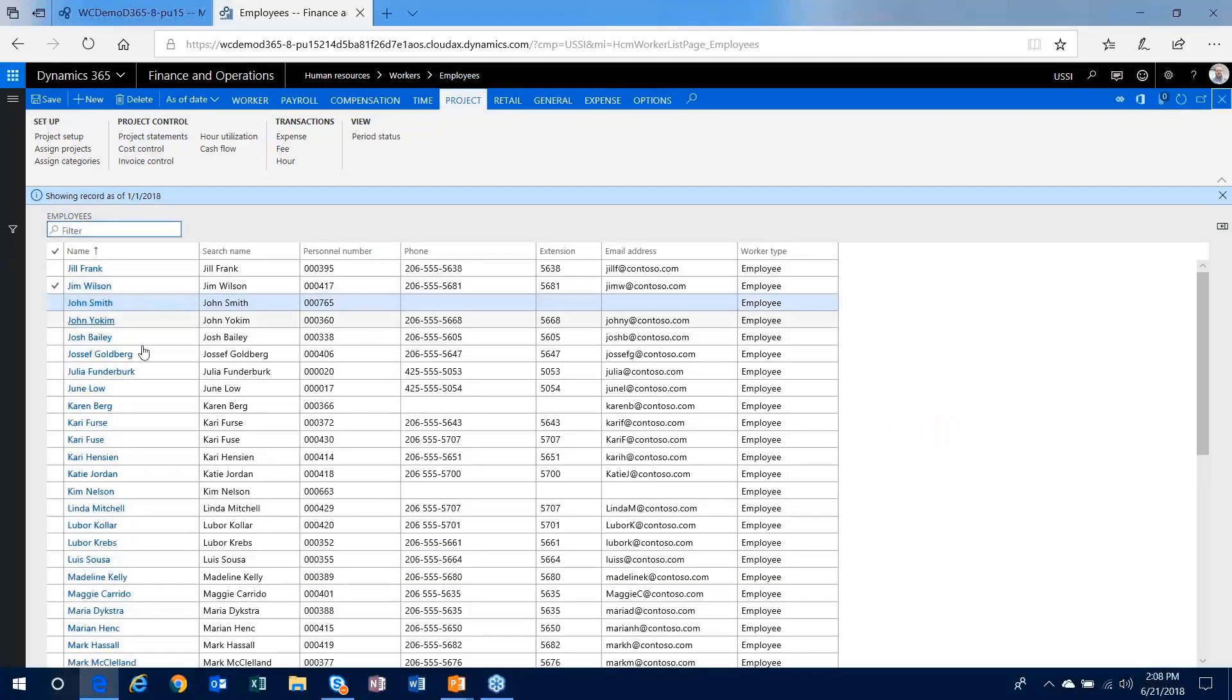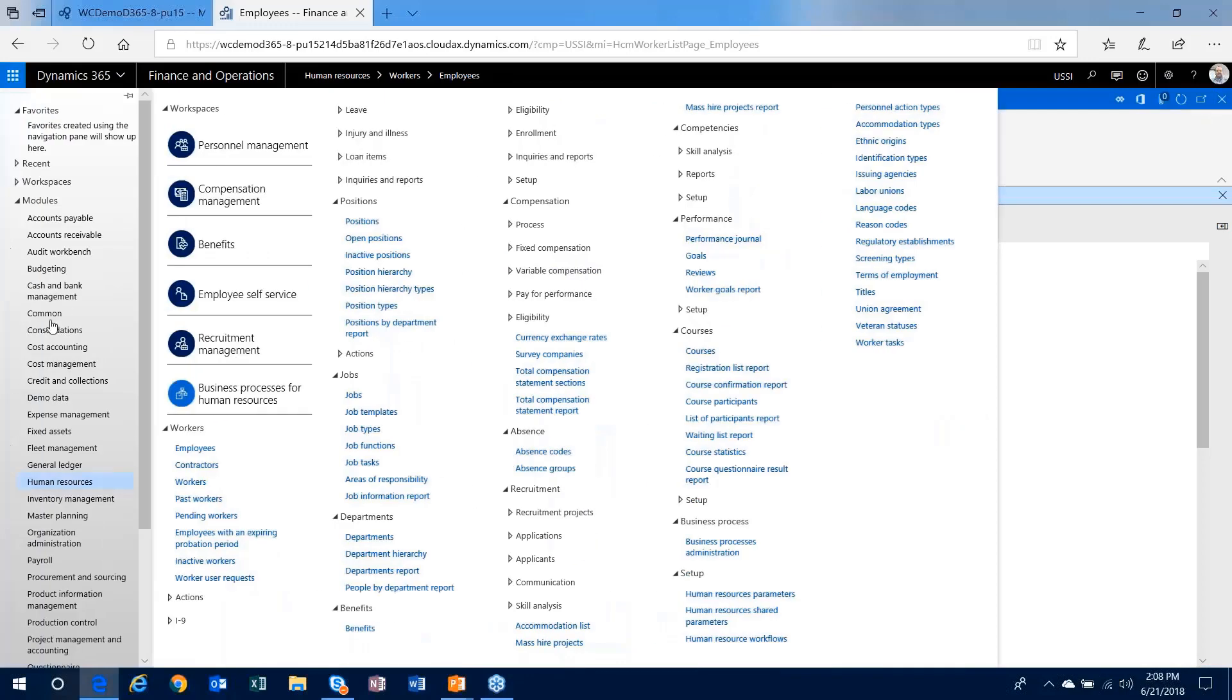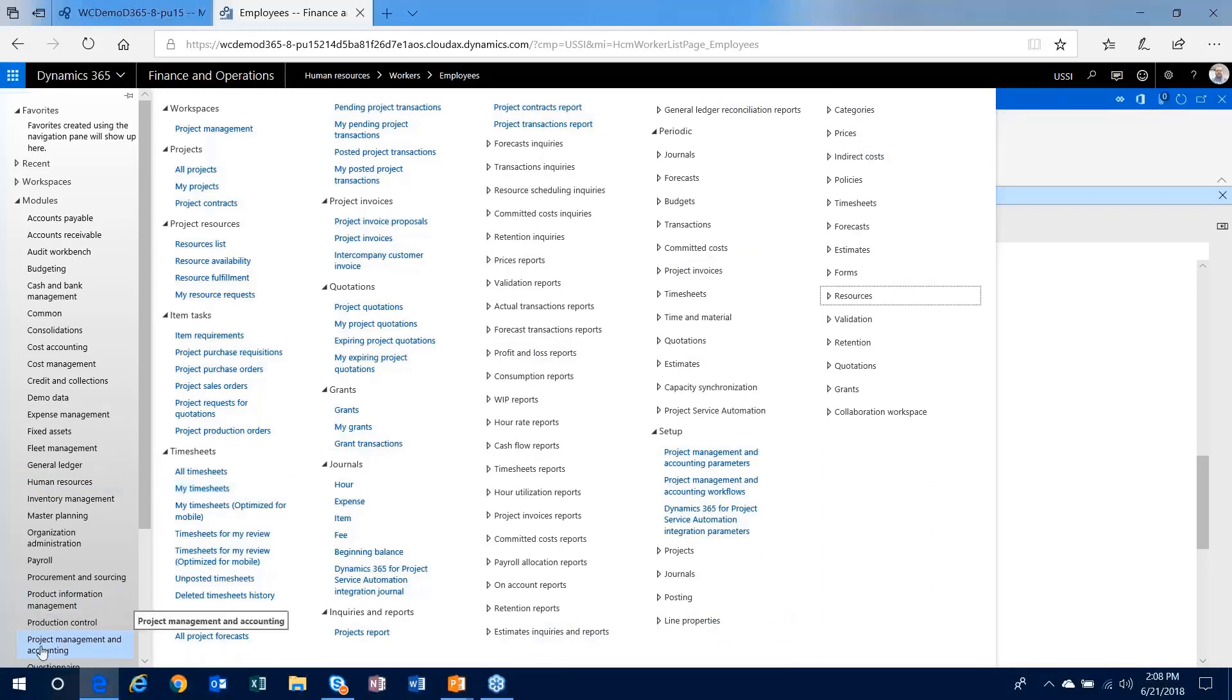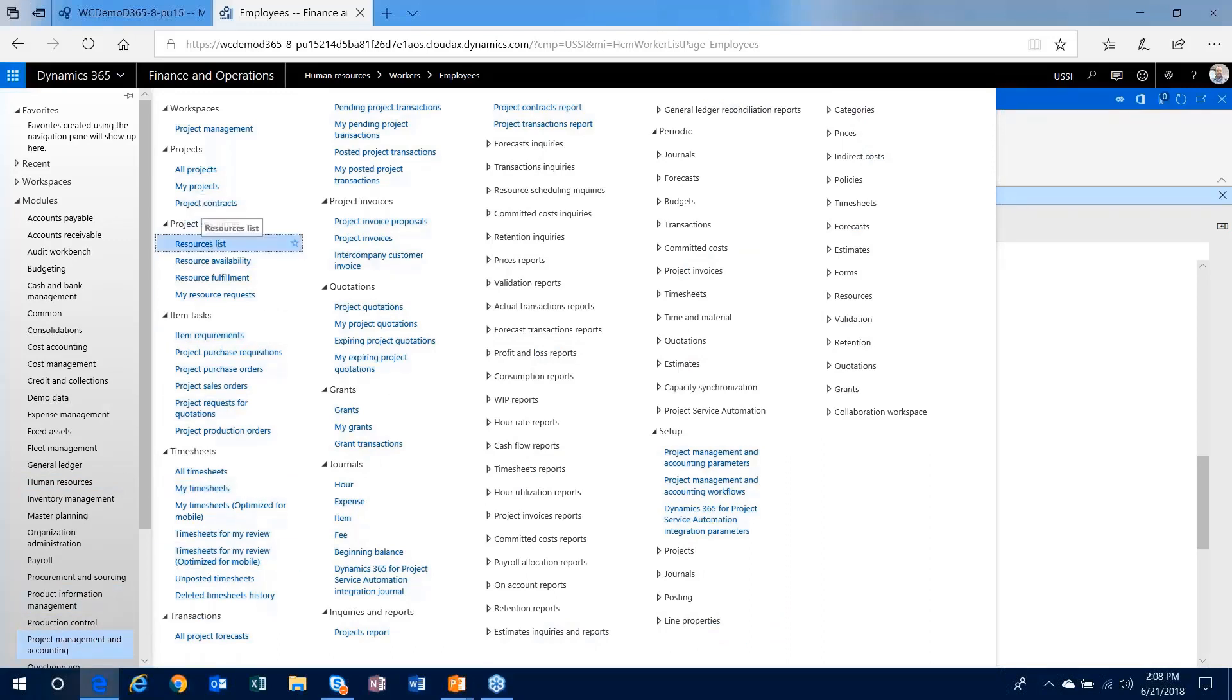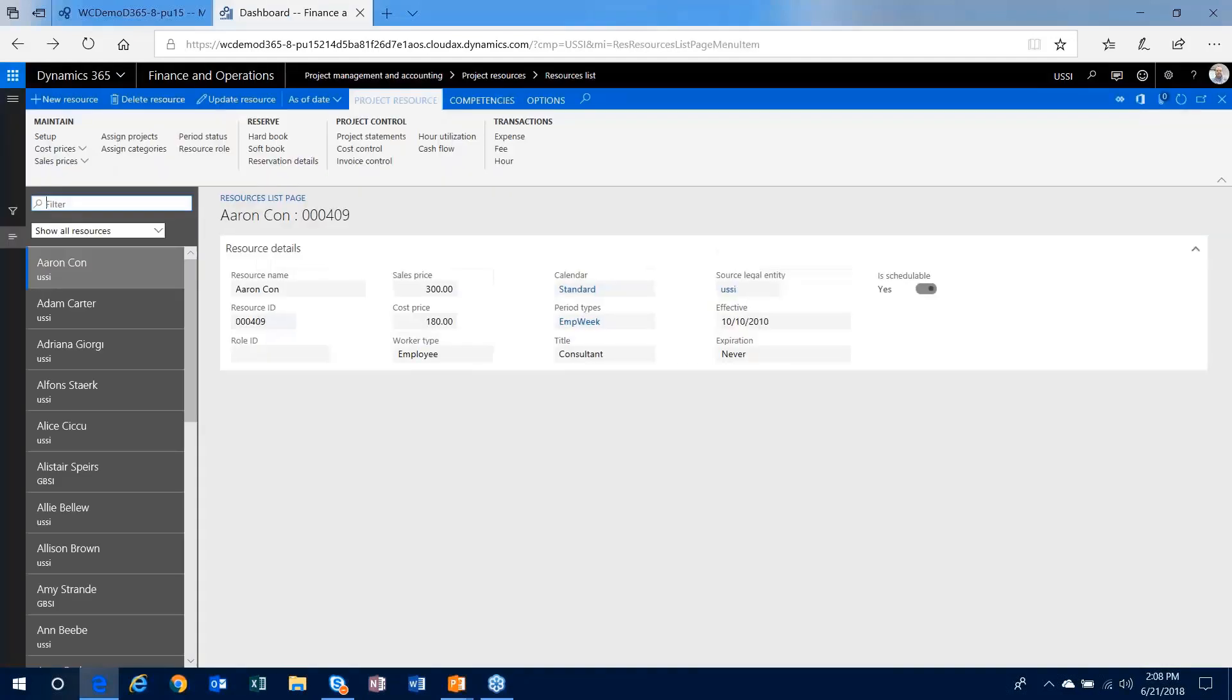So after entering my worker, the next step I would need to do is make sure if I want to use him as a resource, I could set him up as a resource in the project management accounting module. So the first thing I'll do is just head out to my resource list, which is going to be a list of everyone I've already set up.